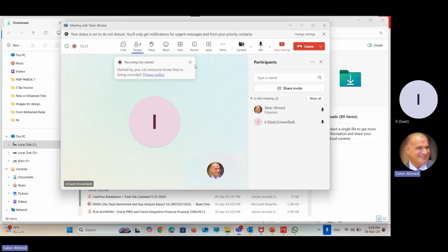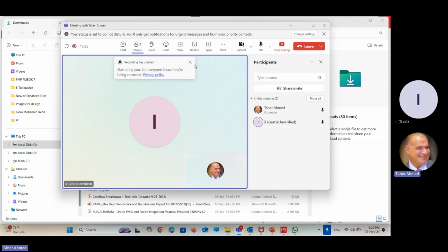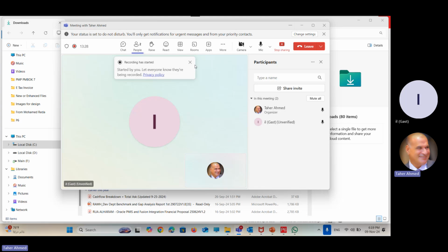After we knew the type of information, we learned about EPS and OBS. And in Primavera language, we call these dictionaries. What are the dictionaries? They are the dictionaries which will be used by all the projects. The aim or the reason for creating the EPS is grouping the projects together in programs to let the higher-level management get a report at a higher level.